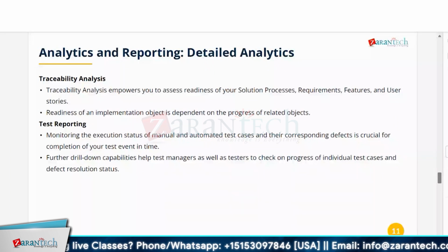When you start a project, even for transports, we have a naming convention. A transport should be named so that it is easily understandable: for which project, which module, which submodule, and whether it is for a defect, new configuration, or a change.